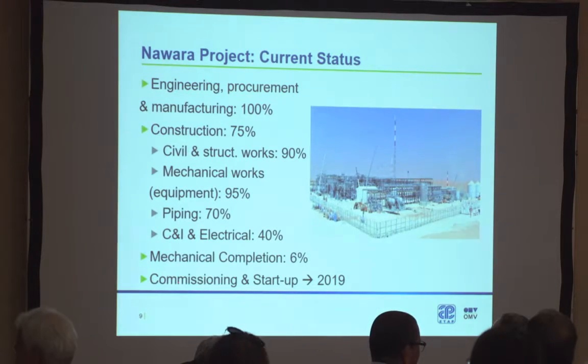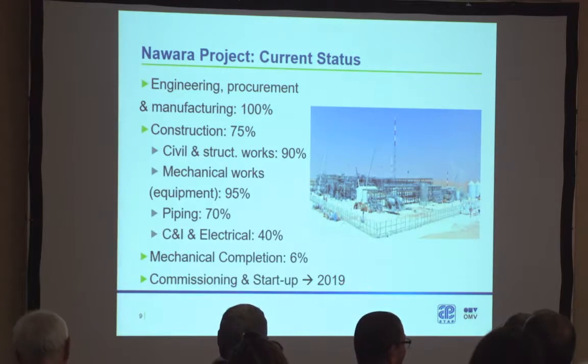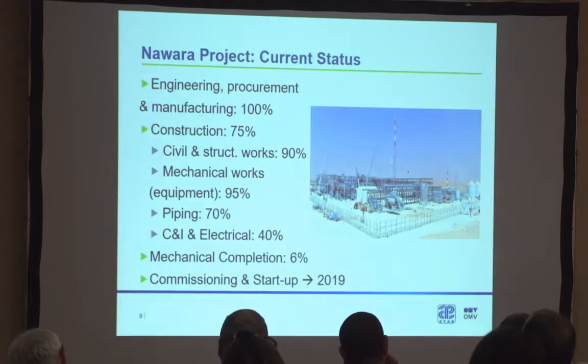So, as I said, the commissioning and startup is planned in 2019. So now we are at the completion phase. Before the introduction of first gas, we need to test and check all the equipment, all the cables, each part of the project facility. Of course, it depends on many factors, like the social stability and the performance of the subcontractors. But the plan is to commission, to test, and the startup in